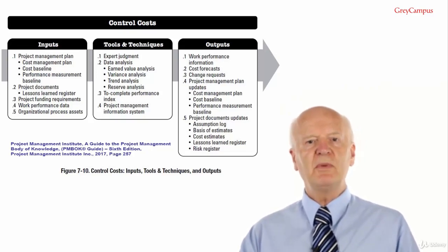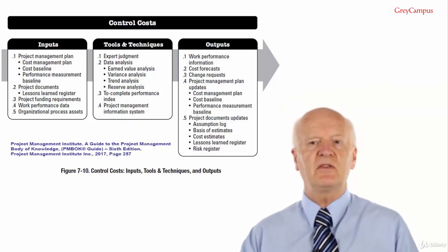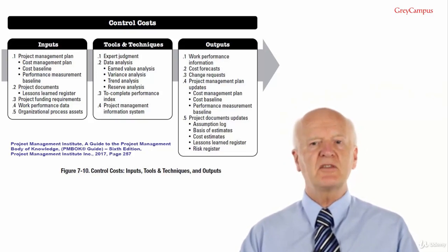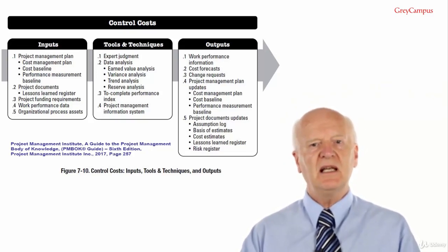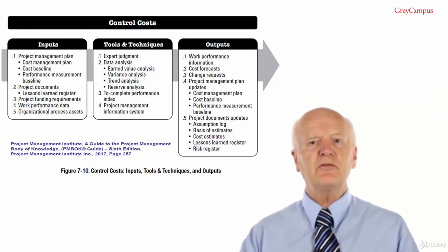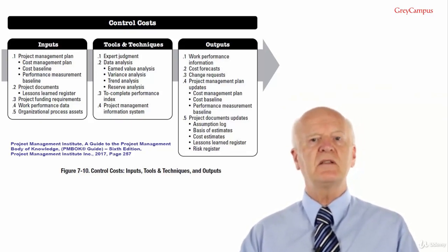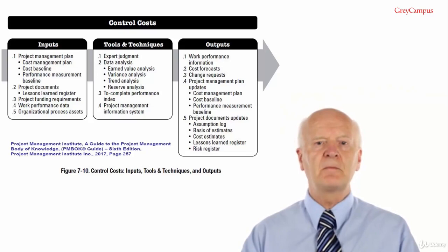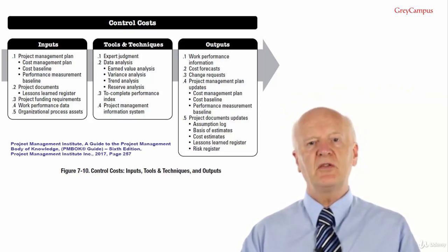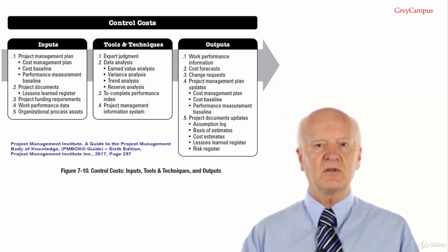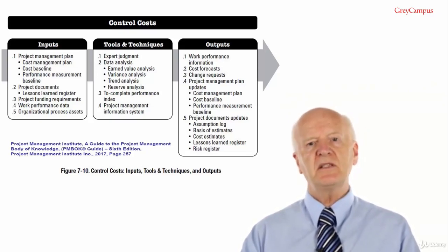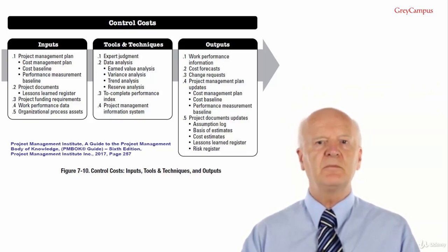For example, you've budgeted $5,000 to build a 50-metre brick wall and it's scheduled to be completed in 5 days. It is now the end of day 3, therefore the planned value at the end of day 3 is $3,000 because you budgeted to spend $1,000 per day. You have actually completed 30 metres of wall, so the earned value will be $3,000 and the schedule variance will be 0 because earned value equals planned value.